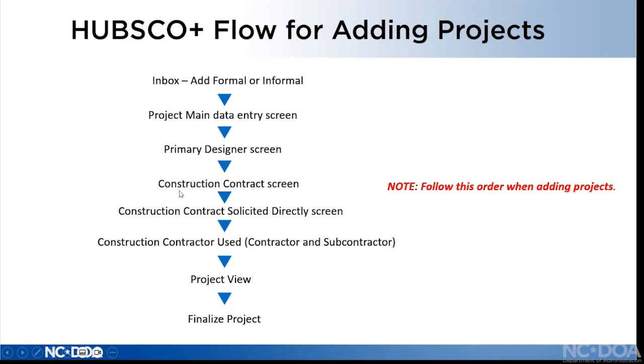But if it's an informal project, you may not have a designer, so you may skip that and go to construction contract screen. If you have a formal project, you're pretty sure you're going to have a primary designer. And we would recommend that you start with the designer first before you get to the construction contract.